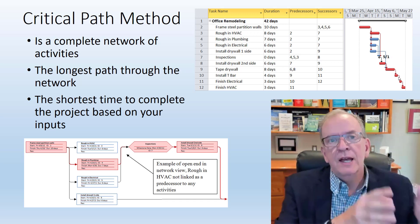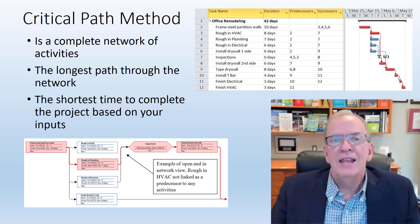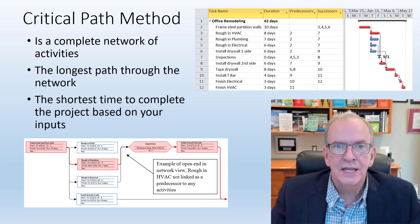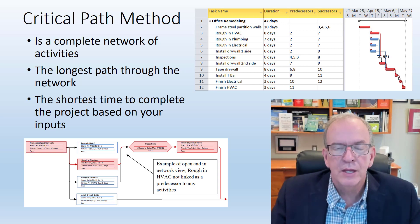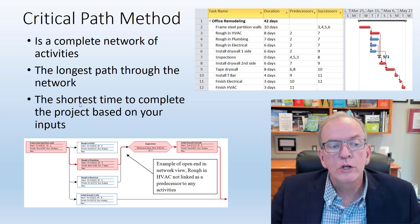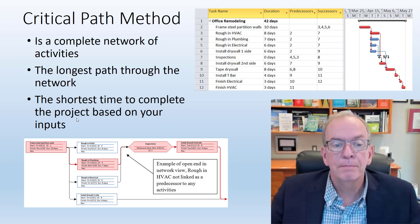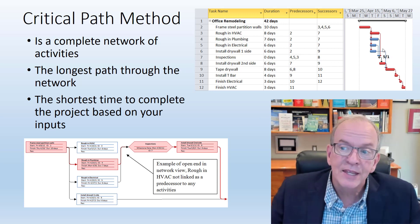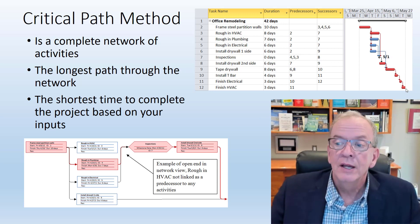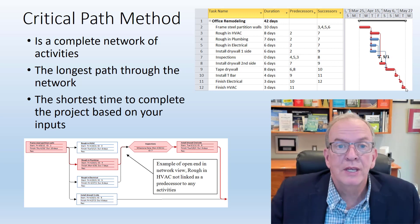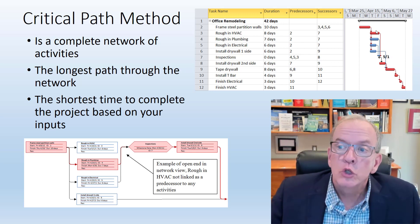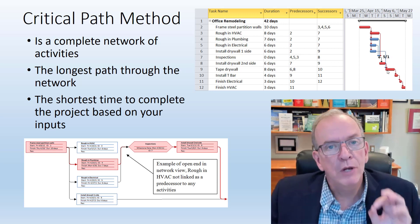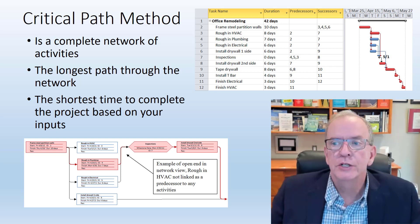It tells you key dates and it tells you impacts of various things that occur on your project so that you can better manage your project. You could say that it's the shortest time to complete the project based on your inputs. Based on all these durations and the network that we put together, that finish date is the soonest that we can finish it unless we shorten something on the critical path.